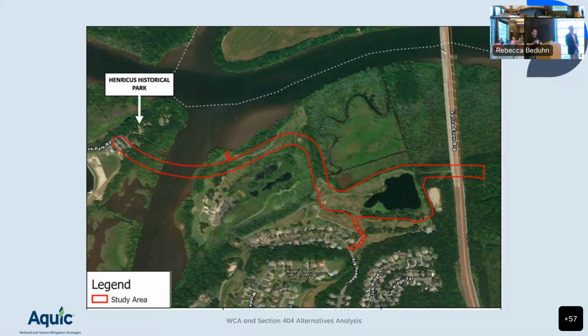Okay, they don't necessarily conflict. So we have four different, what we call scopes. NEPA would be less involved in this one, even if it's procedural. The one that matters is the National Historic Preservation Act, which we have to comply with, Section 106. That would force us to define the permit area of this, and that's a whole other outreach event to talk about.